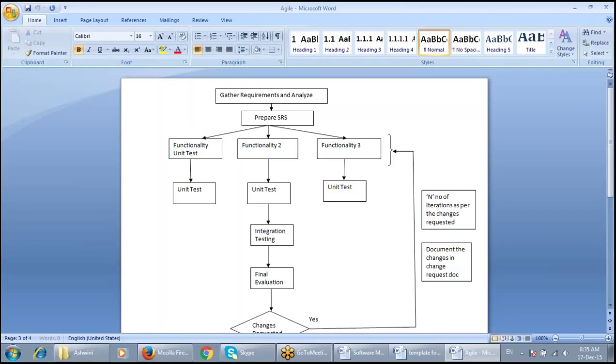and at the end, maybe when we are giving the complete outcome to our client, we'll be showing some working prototypes to the client. Okay, at the end of a week or at every 10 days, we need to show them the work status, and this work status is like we'll be showing some working prototypes to our client. If it is fine for our client, then we'll proceed with developing that. Or else we will be mentioning some changes, whatever we are supposed to include. So that it's like every now and then, or like very frequently, we'll be meeting our clients and he can include some changes if he wants, or else we'll continue with the existing one.